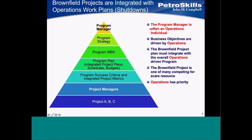There is a program strategy — the turnaround may be a two-week event. Then a WBS or work breakdown structure, i.e., the things that need to be done. Then the plan — typically a very detailed schedule, often detailed to the half-day or four-hour cycle. Then success criteria and project metrics, then the PMs — and these projects are at the very bottom of the pyramid.